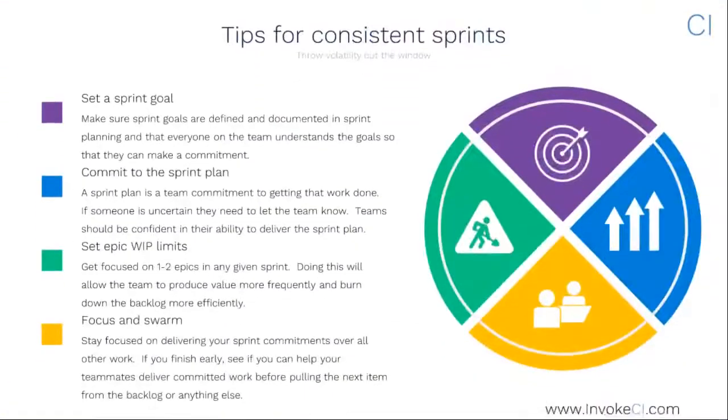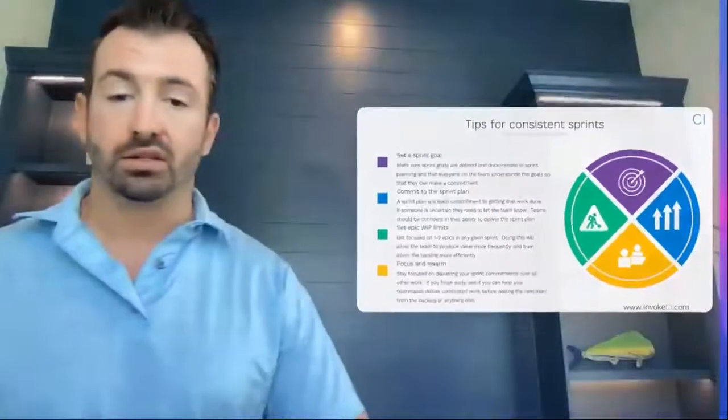The last tip, tip number four, focus and swarm. Stay focused on delivering your sprint commitments over all other work. If you finish early, see if you can help your teammates deliver committed work before pulling in the next item from the backlog or anything else.